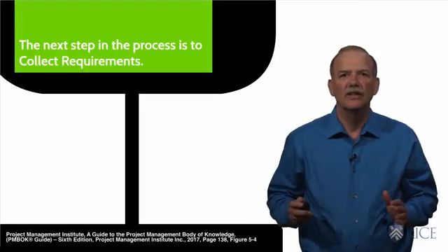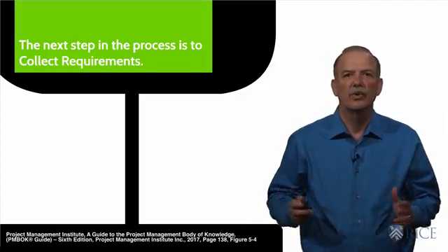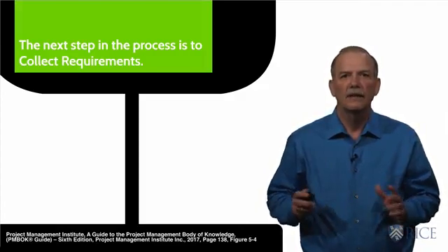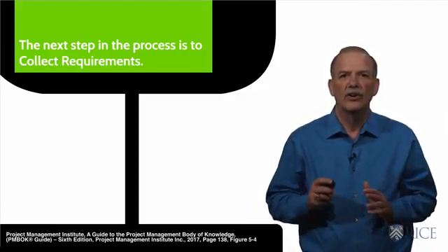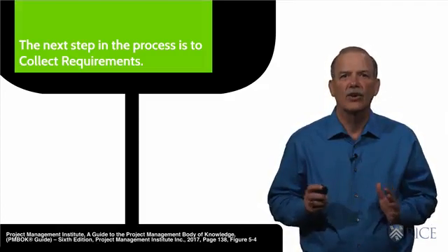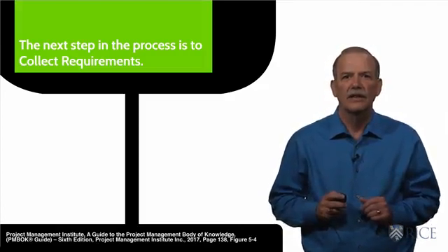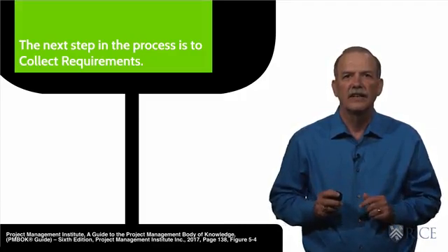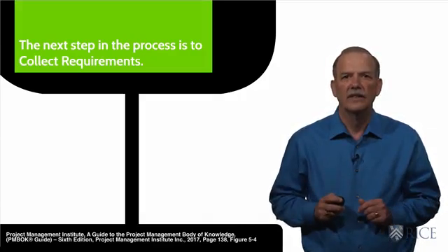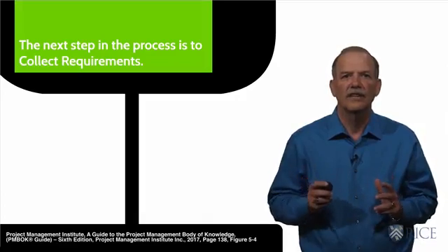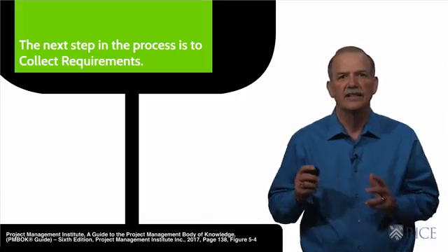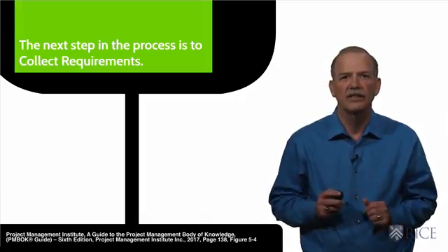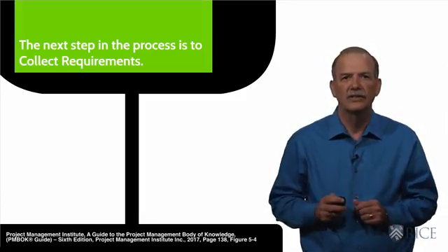So we have a new project. Where do we find the requirements? In some cases, the project charter or the contract for the project defines all of the requirements. This is typically the case where the project has been studied extensively and is a well-known activity. The requirements may be referenced in a set of specifications and a detailed scope statement attached or referenced in these documents. This is an ideal situation.